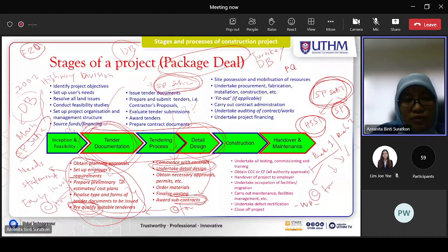Okay, so if they decide to do design build, normally the client can do pre-qualification to invite a design build contractor who is interested and has the capability to join the project. This involves the client and his consultant. Right, then they call for the main contractor.